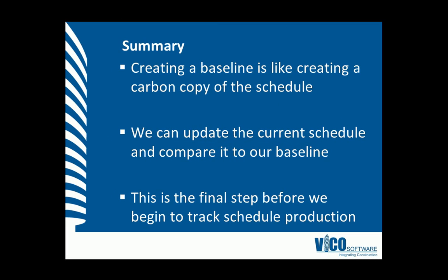In this vignette, we've learnt that creating a baseline is like creating a carbon copy of the schedule. We can update the current schedule and compare it to our baseline. This is our final step before we begin to track our schedule in production control.